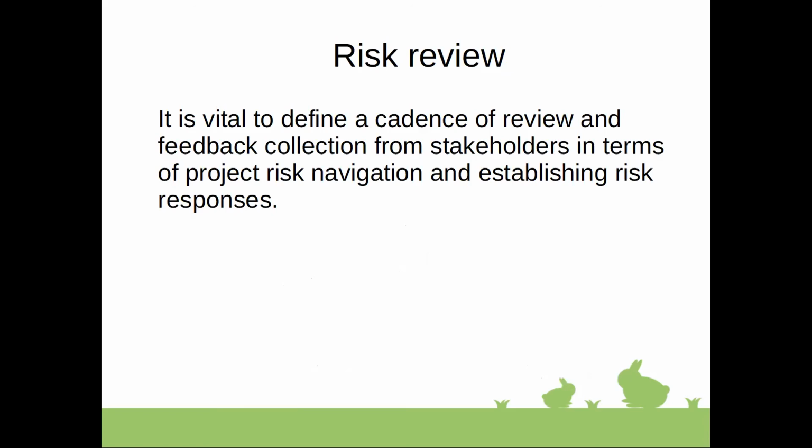So going back to the risk review, it is vital to define a cadence of review and to collect feedback from stakeholders in terms of project risk management, having observations of new and existing risks, and defining risk responses in terms of applicability to each part of each objective within the project, as well as identifying responsible parties within the project team or within stakeholders.